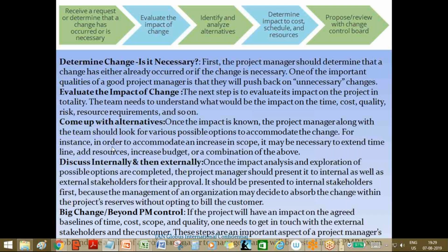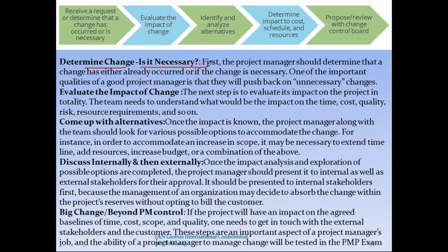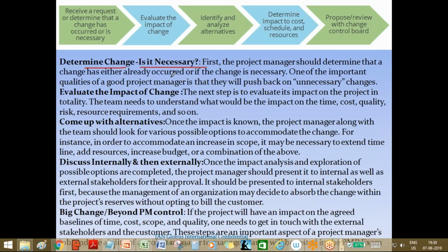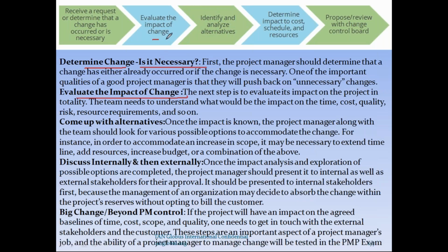Okay. Now, as I said, first of all, let me again put some more details on the steps. First of all, determine change. Is it necessary? Okay. Is it necessary? The change, is it necessary, or is it clearly documented? That's the first step. Second is what? Evaluate the impact of the change. That's the second step. Okay. Second step, evaluate the impact of the change.